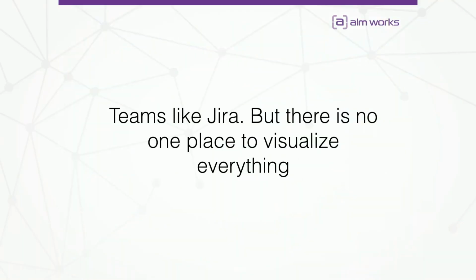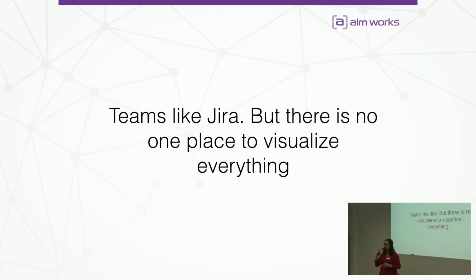So there is a little problem in tooling. Teams really like Jira, and teams don't want to go somewhere else from Jira. But there is no hierarchy in Jira, except stories, epics, and subtasks. And there is no one screen or page where you can see everything in your Jira, and no place where you can see anything except epics, stories, and subtasks. So there is no place for the portfolio level from your Scaled Agile picture, and it's a problem for management teams,